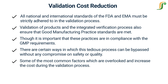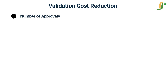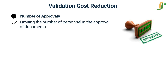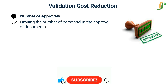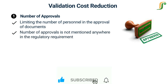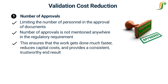The first factor is the number of approvals. The first step that can be taken to cut down costs and reduce time delay is by limiting the number of personnel in the approval of documents. The required number of approvals is not explicitly mentioned anywhere in the regulatory requirements, and thus can be limited to a minimum number of document reviewers. This ensures work gets done faster, reduces capital costs, and provides a consistent, trustworthy end result.